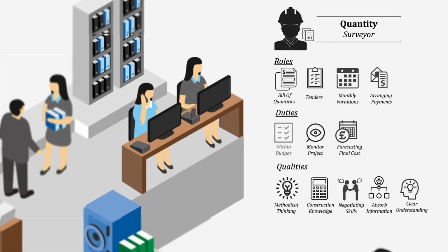Besides, a quantity surveyor is responsible for controlling the predetermined budget and expenditure of each stage in a project. He also monitors and tracks project progress so that he can make sure of the measurements and valuation of variations easily, then forecast the final cost of a project.